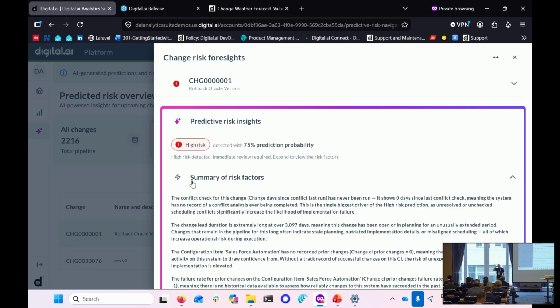The funny thing is, one metric that I like a lot is the number of words when you describe a change. People have to write a change, so they need to describe it. There are organizations where a change described with very few words has a higher failure probability, because obviously you didn't explain the change well enough.